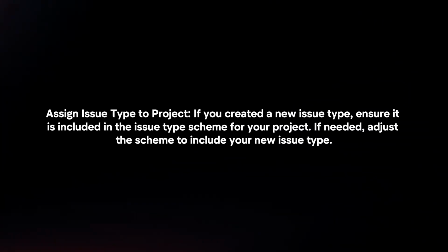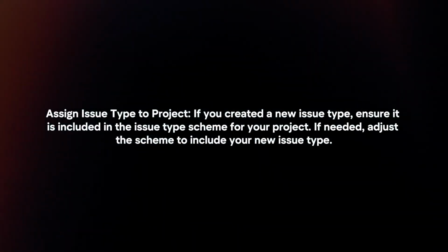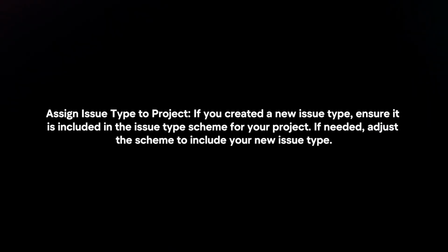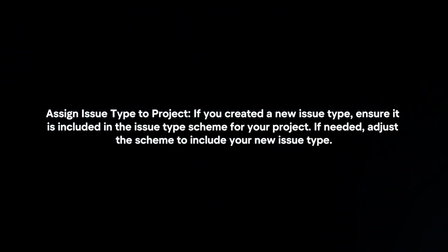Assign issue type to project. If you created a new issue type, ensure it is included in the issue type scheme for your project. If needed, adjust the scheme to include your new issue type.